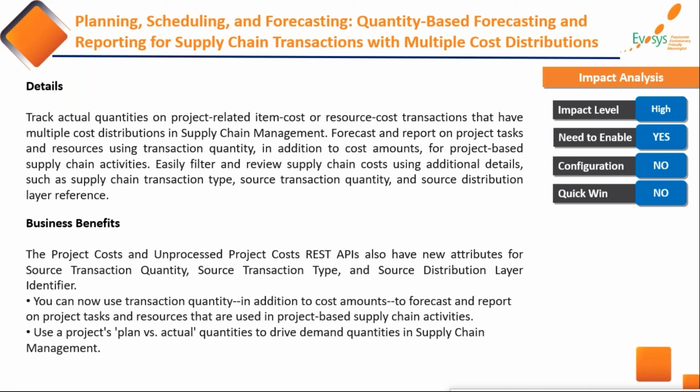So even though I have earned value analysis in the Oracle module, Oracle PPM, I can't use it because it just gives the amount driven earned value and not quantity driven. So for the inventory driven supply chain, now they are bringing the quantity also with cost. So I can have forecasting based on quantity, rather than just looking at the amounts.